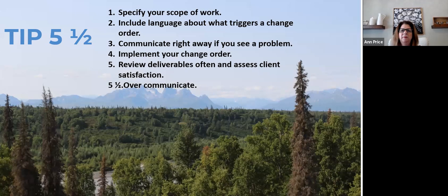So Matt has inspired me to do this 5.5 tips. Just to kind of review, specify your scope of work, include in it language about what triggers a change order, exactly what's going to happen. Communicate right away if you see a problem. If you do that kickoff meeting, those status reports, those monthly calls, hopefully that's going to head some of this off at the pass. And then really implement that change order. If something has triggered it, you got to do it. You got to put your big people panties on,